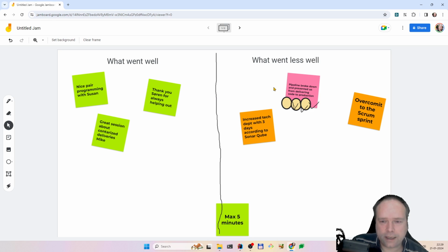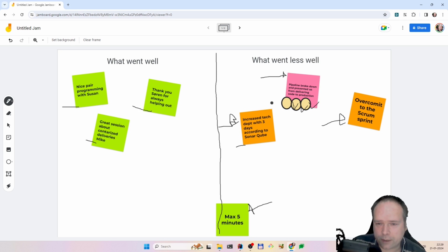That's one thing missing actually. After everybody places the notes on the board, then the Scrum Master will read the notes, and if there are any questions, especially what went well, it's okay that the Scrum Master will read that up. But otherwise usually it's the team members who made these messages that would read them, because they know the meaning behind them, and they will also explain the problem, like what was the problem with the pipeline and all that. So if your Scrum Master leaves the scene to the developers, let them read up their own notes, then you also get a break.